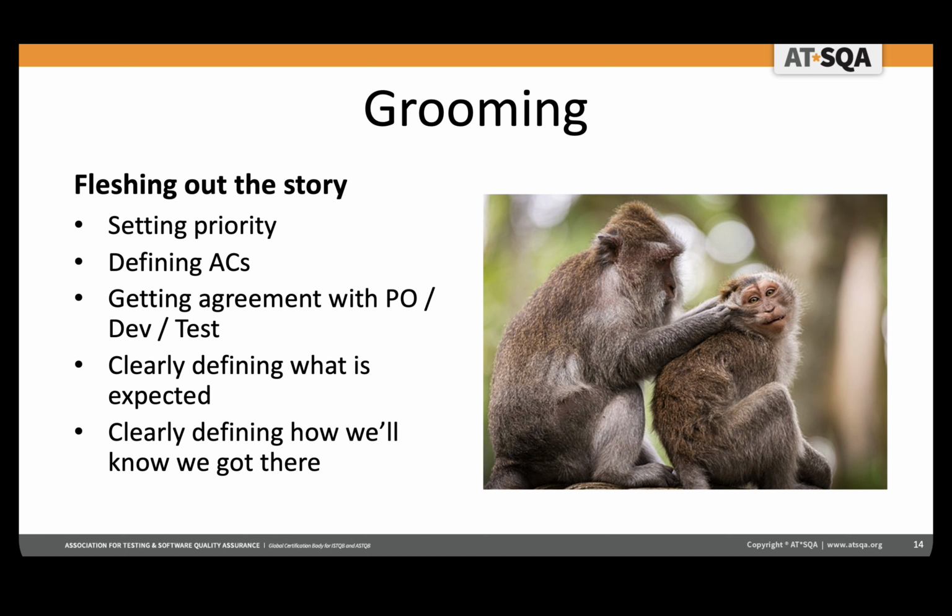We want to walk away from a grooming session going, okay, I understand what this story means. I understand what it's going to take. I understand how to test it. And I understand how to know if it works. That's what we're coming out of the grooming session with. Each story has to be groomed, so this isn't just a one and done kind of thing. It's a continuous process with the stories, to groom them and make sure that they've got everything they need before implementation starts.